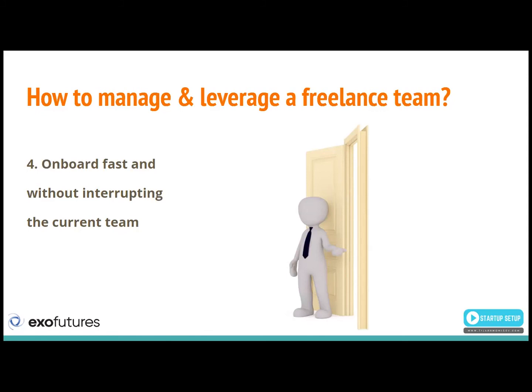I prepare everything for the person when they join, but also it wouldn't mean much writing this document describing our work processes if these work processes were not already in place. And that's also one of the common mistakes with the startups, because they start as a small operation and they think this is an overhead, this is something they don't need. If it's only me as a founder and one more programmer or two more people with us, we're gonna just jump on a call, exchange a couple of messages on WhatsApp or Telegram or something, and the things start going. But then we have a huge problem because our team won't scale. The people who join down the road, they won't be able to understand what we've been working on.